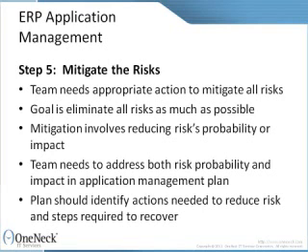The plan should identify what actions need to be taken to reduce risk, as well as the steps required to recover should a failure occur. An example might be a test implementation of certain hardware before the go-live date. Because ERP application management involves so many variables, the risks increase significantly. However, with proven expertise and experience, a project team can navigate the rough waters through an implementation with minimal negative impact on the organization, its people, its suppliers, and its customers.